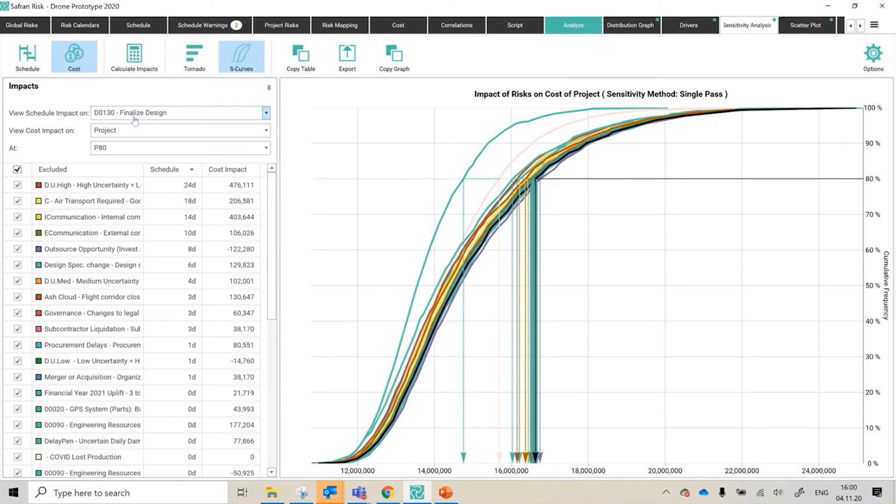And it wasn't until I went back to the developers and investigated with them that they pointed out what I'd done. Because I was using the alternate position based on action toggle, blending my pre and post mitigation together, the post mitigated costs of mitigating the air transport risk, meaning upfront cost or investment to guarantee a booking of some extra trucks on the road or wherever it might have been, was actually coming through and affecting the design phase.